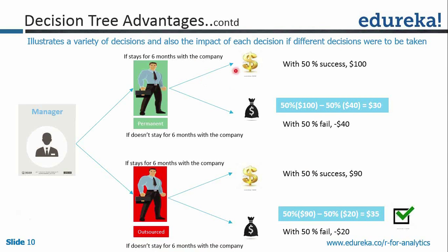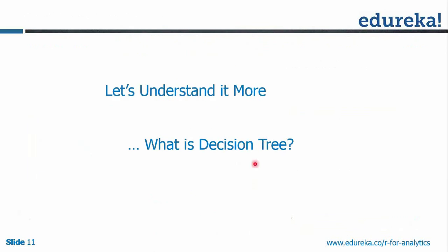With each decision, you might either succeed or fail. The values associated with success and failure are listed. You multiply probability by impact for success, probability by impact for failure, subtract these two to get the expected monetary value. Decision tree not just classifies but also provides details on what is the success and impact associated with each decision. Decision tree is a supervised, rule-based classification. The top-most node is called the root node.